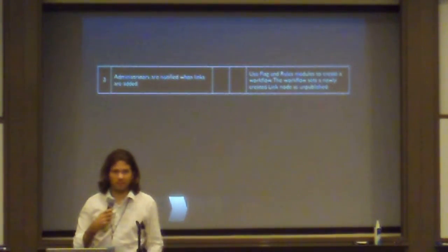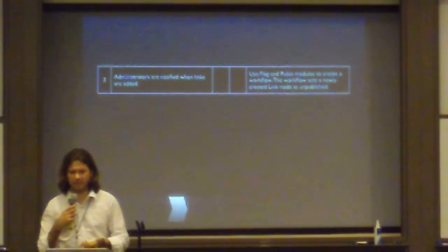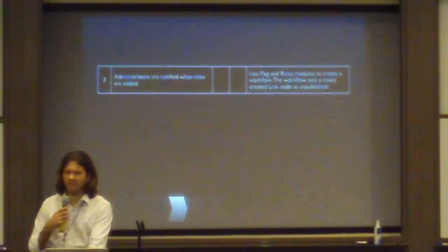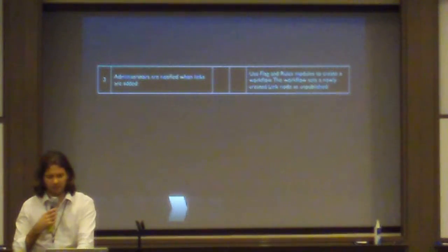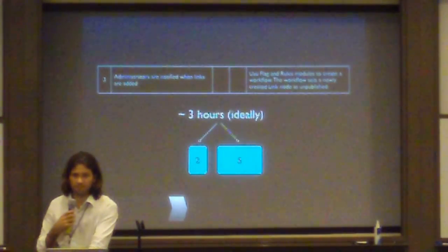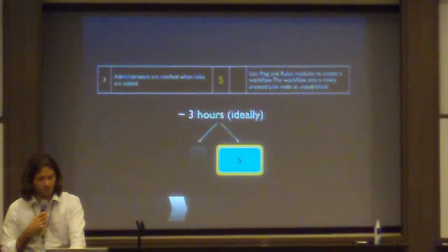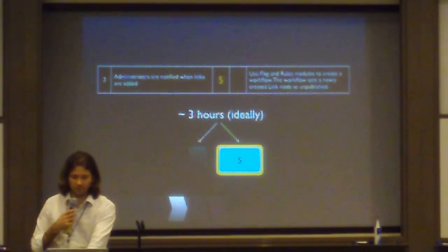All right, so I just figured how long has this taken? Have I done it before? Well, I think it will take about 3 hours ideally. But 3 is not in the scale. It's 2 or 5, which means I have to go with 5 because I have to round up. So I set the feature to 5.